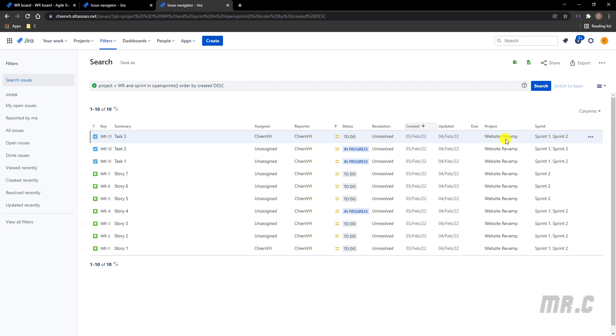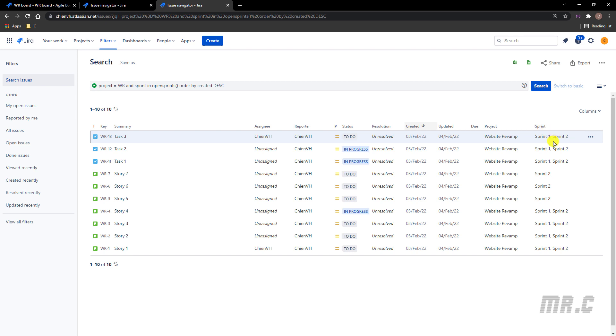You take a look into Sprint 1 and Sprint 2. Because we have some tasks here still not complete in Sprint 1, so they will move from Sprint 1 into Sprint 2. That means when I take a look into the Sprint column, I can see we have some tickets belonging to Sprint 1 and Sprint 2 here. Because it's still not complete in Sprint 1, so we have to move it from Sprint 1 to Sprint 2.